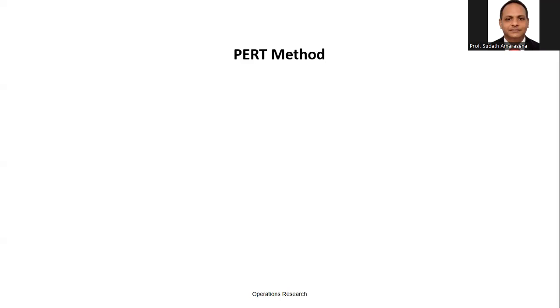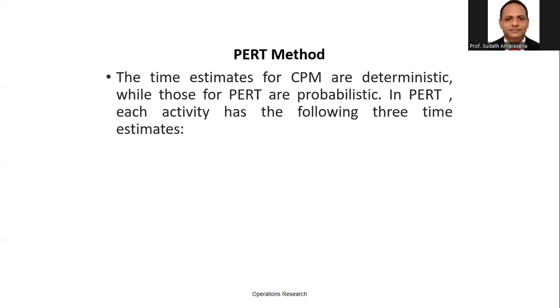Environment changes do not mean bad weather conditions every time. Sometimes good weather conditions help complete the entire project within a short time period. Also, new technology identification helps complete early. Identifying new material helps complete early. Likewise, there are so many changes. But under the CPM method, we didn't consider these changes.